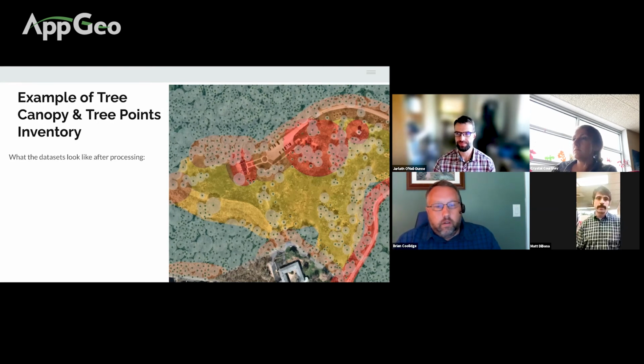We were planning on acquiring the raw LiDAR in spring going into summer of last year, 2020. However, everything got pushed out until September, and we were a little reluctant to take a photo that late with leaf drop. However, as we found out, it actually provided us way better information. You can probably go into further detail with that, Brian, on what it really provided for us.